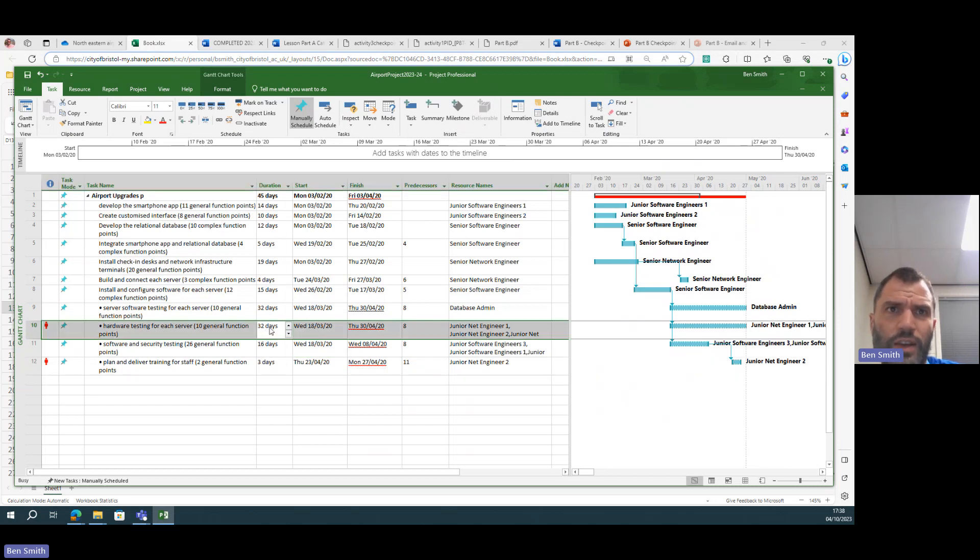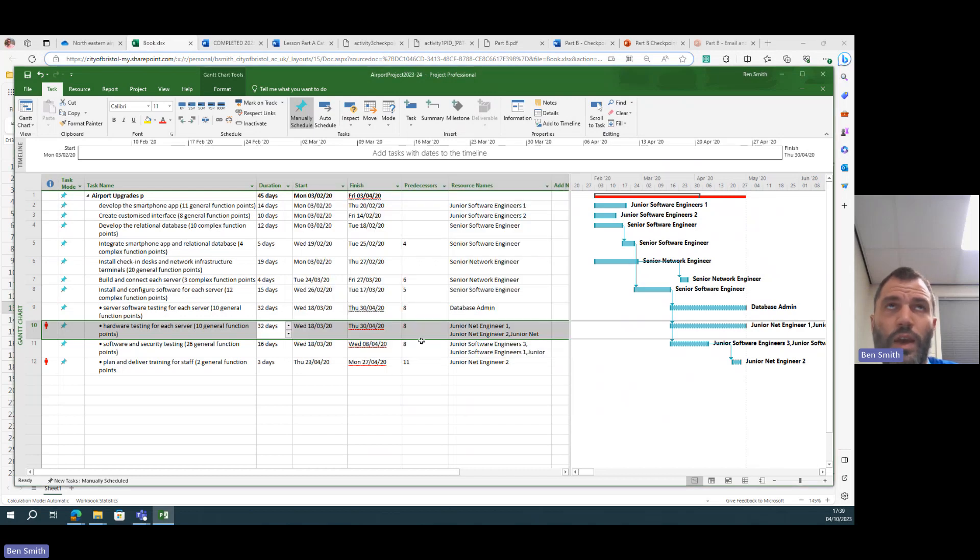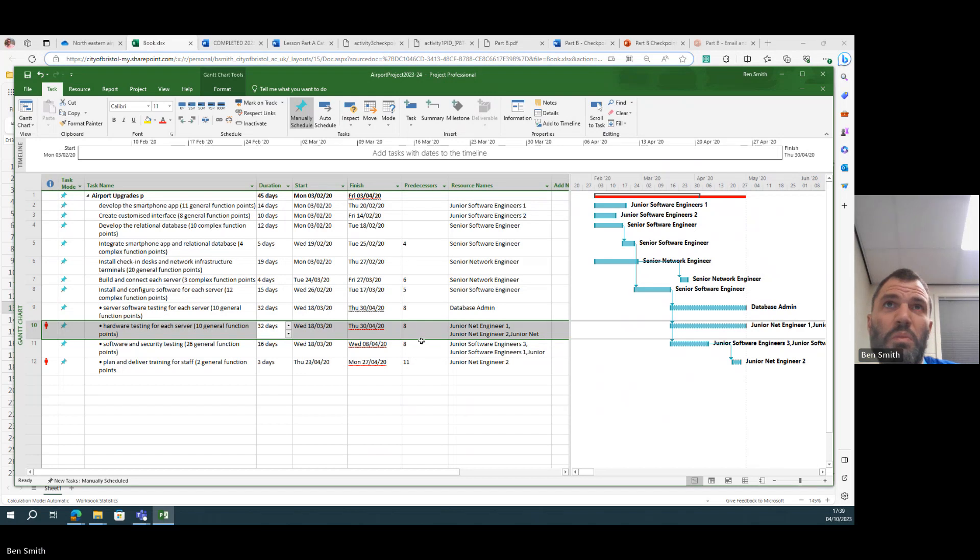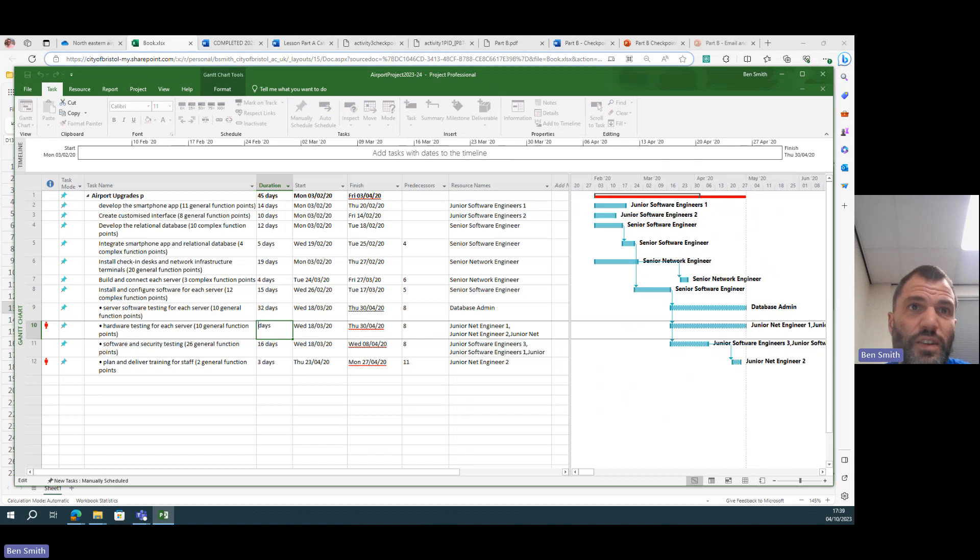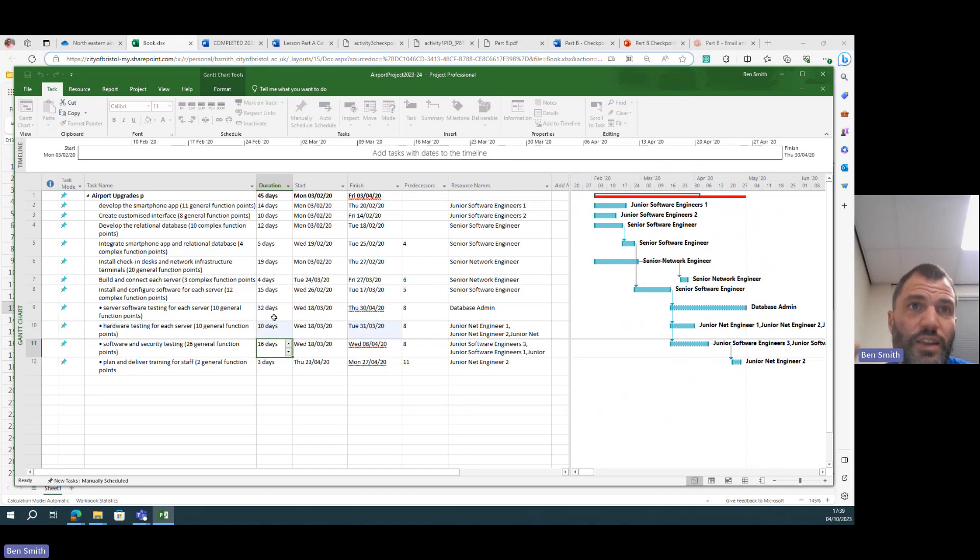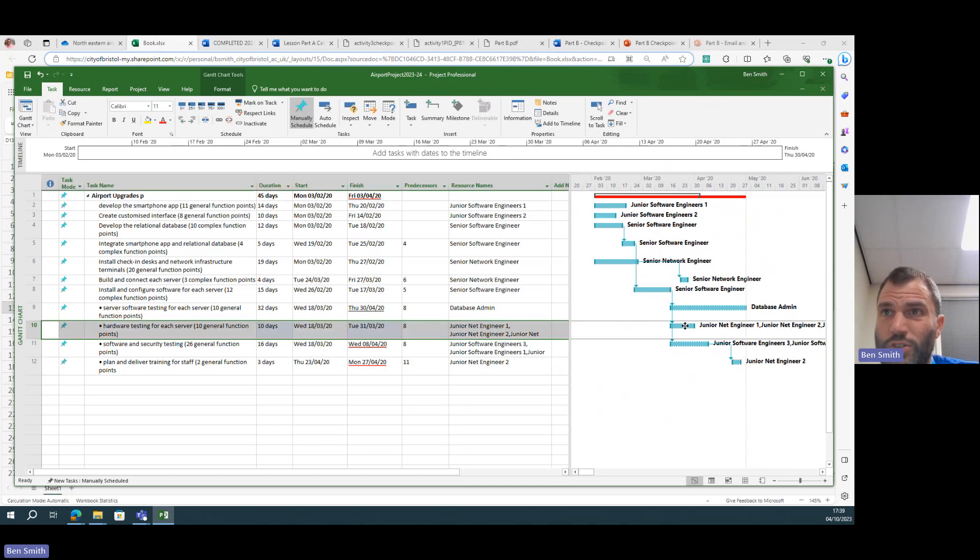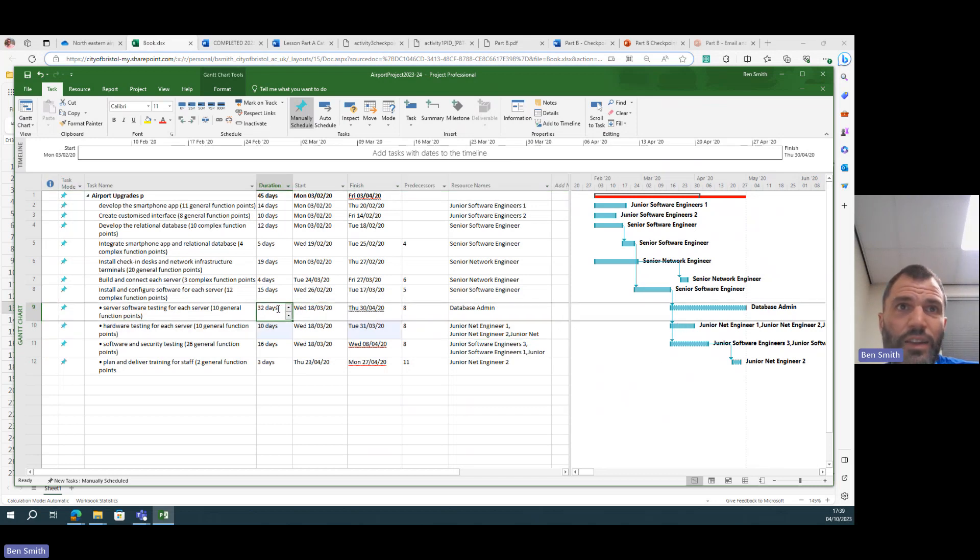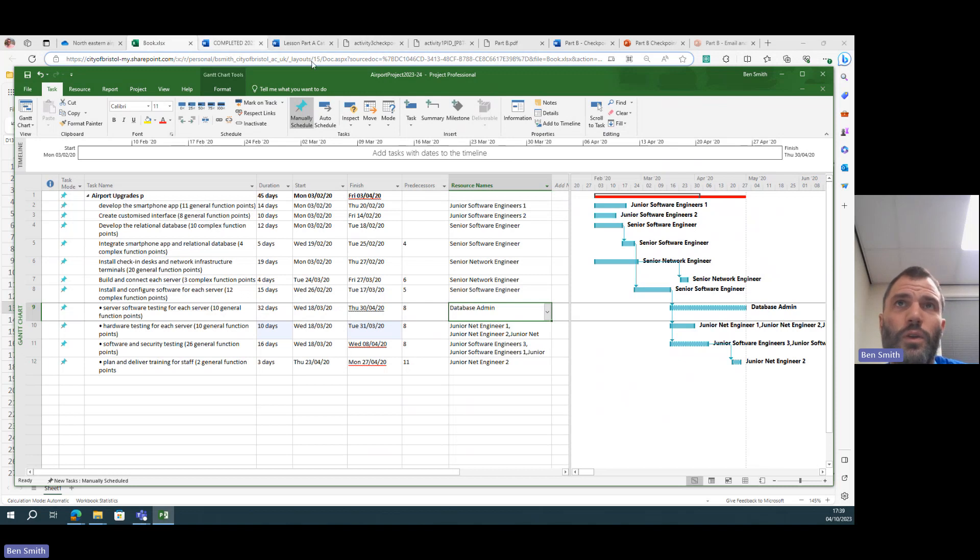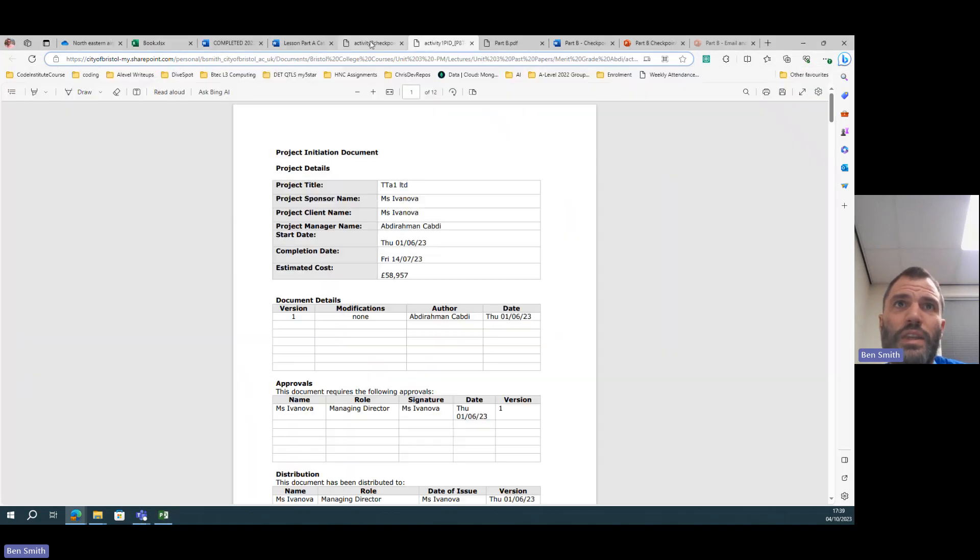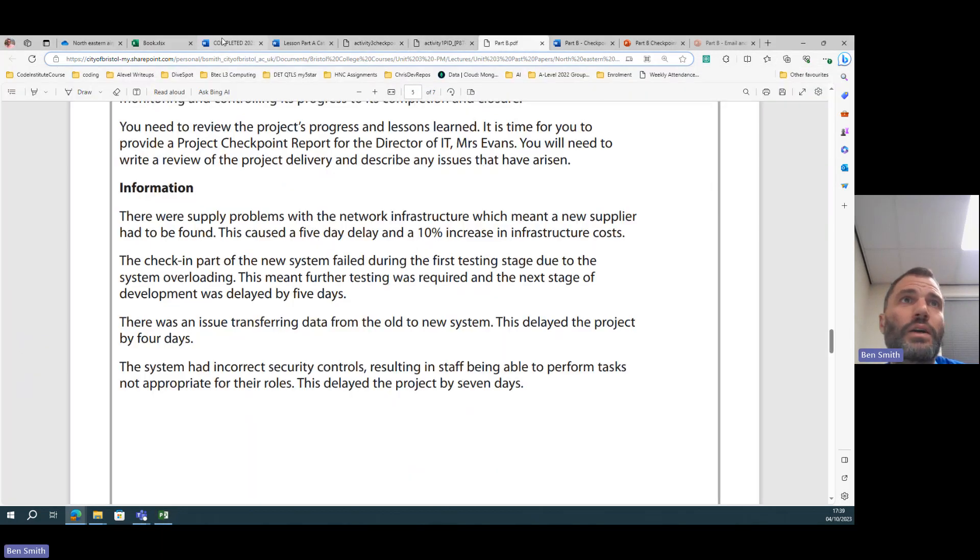So this one would need to start doing this task when they finish this one. But we can cut this task down, we can divide 32 by three, so we get one. Let's say it's going to take 10 days now because we've got three of them on here, it's only going to take 10 days.